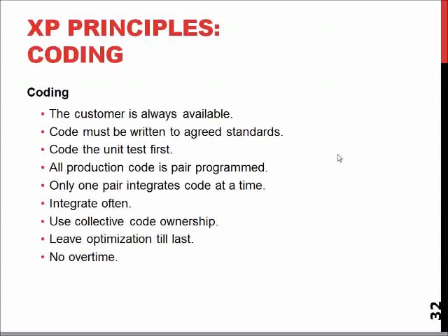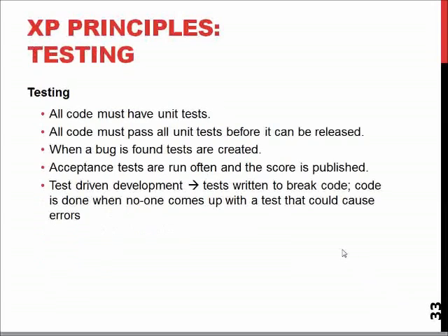The optimization work is something that's done after the system works, and the interesting part here is the no overtime part. In extreme programming, the idea is that it's so exhaustive approach into development, so you should not be doing overtime simply because your output isn't as good after 7-8 hours of continuous work, as it would be if you are rested and have frequent breaks or lunches or ability to rest every now and then.